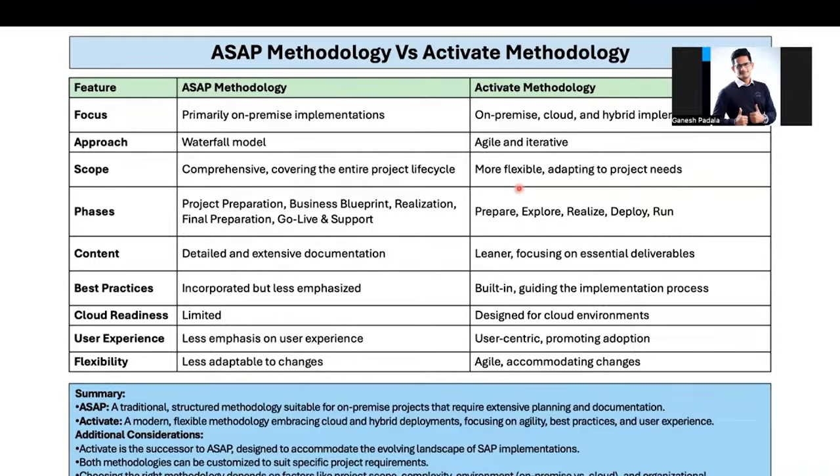SAP is not a single product, right? It is interlinked: SD, material management, production. Everyone needs all the modules. Without material, I cannot create a production order, and without sales organization, I cannot do an order-to-cash process. It's all interlinked. So we have to move in somewhat of a waterfall method, but the sprints will be helpful for project management to segregate the work and see the deliverables.